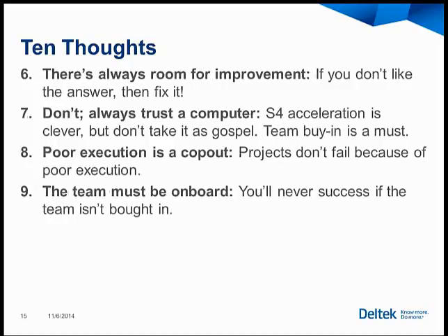Number 8, this is some tough love here. Poor execution's a cop-out. Projects don't fail because of poor execution. The projects we've seen, the projects we've been enlisted to do forensic analysis on, when we go back and unfortunately retroactively look at the baselines of poorly executed projects, we spot the problems in the baseline that manifested themselves throughout execution almost every time. I want to say every time because I can't think of any examples where we haven't, but I'll weasel a little bit and say almost every time.